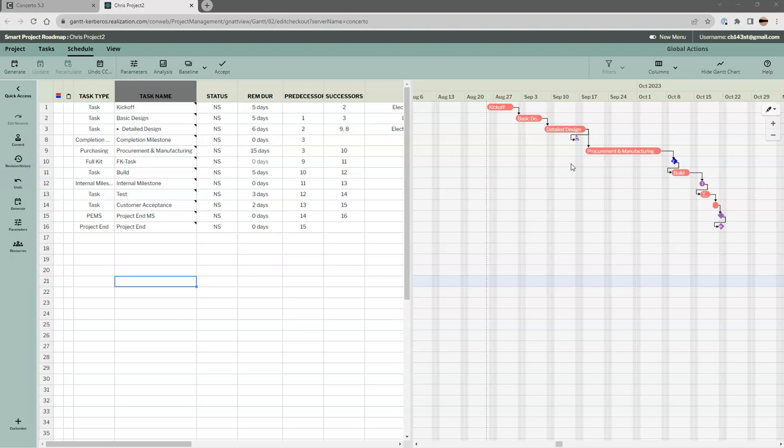So it also helps us to set priorities. So if one project within a portfolio is running behind and another project is running ahead, we want to focus capacity, if we have limited capacity, on that project that's running behind, because we really want all the projects in our portfolio to finish on time, right? So without going too much further, and there may be some questions around buffering, and we can answer those separately. I can include just an individual or separate video on buffering if you want to, but you guys let me know.